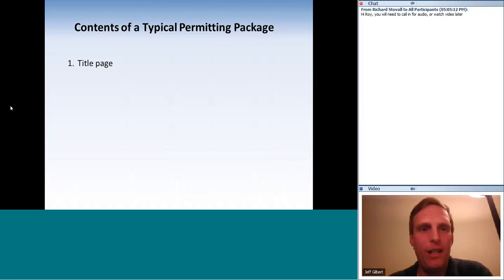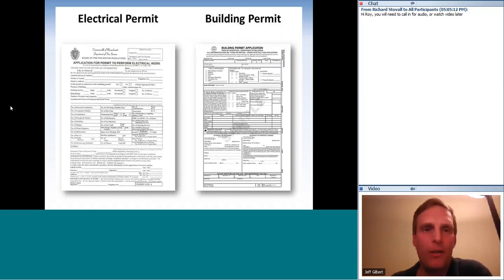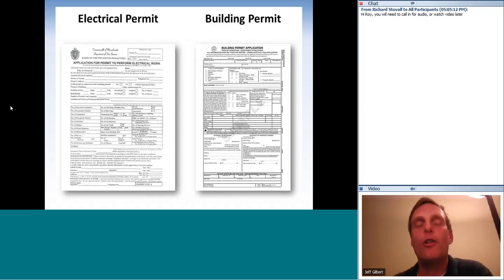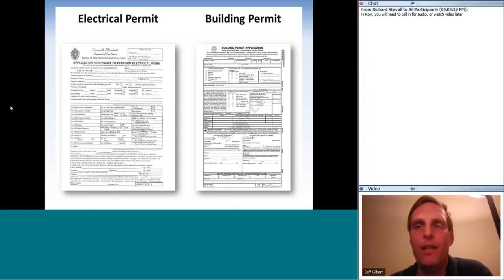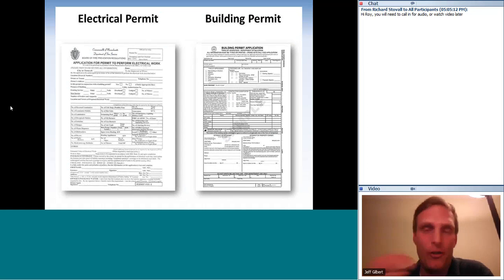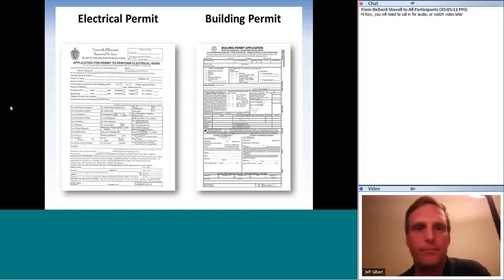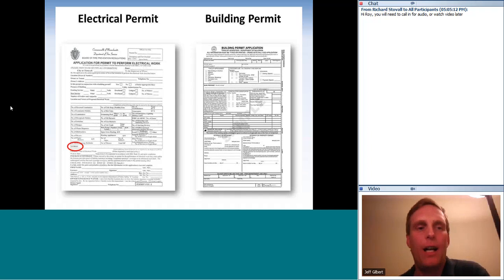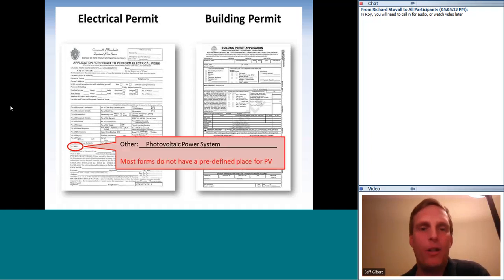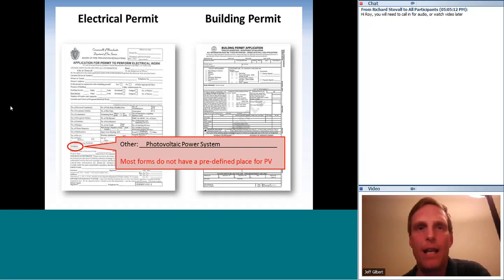The second part is completed permitting forms. In most jurisdictions — certainly here in Maryland — we always need an electrical permit and a building permit. The electrical permit is obvious because we're doing electrical work. The building permit is needed because we're mounting things to a roof. For ground mounts, they may want a structural drawing. On electrical permit forms, unless it's California, you'll likely need to write in 'photovoltaic power system' under 'other.'